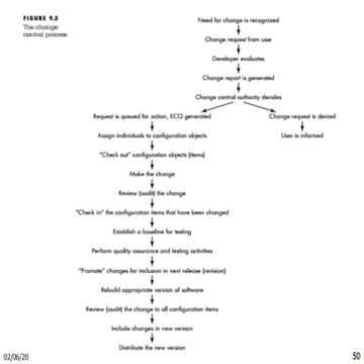The results of the evaluation are presented as a change report, which is used by a change control authority, CCA, a person or group that makes a final decision on the status and priority of the change.